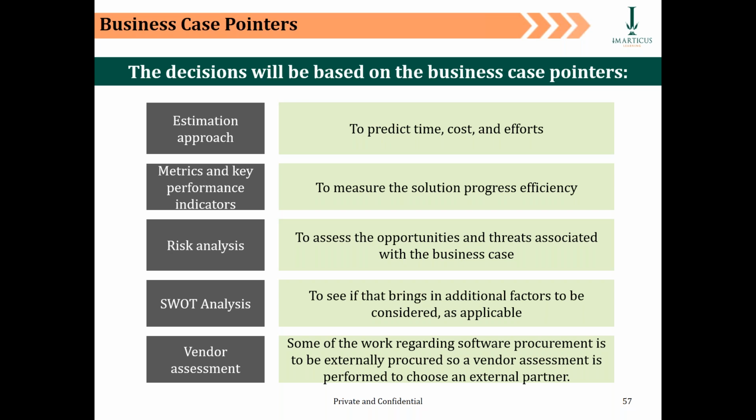Third thing is effort. There is a requirement which has an IT orientation, so it needs to go through the SDLC. After I finalize the requirements in my BRD, what is the total effort required by the IT team to, number one, write the design specification; number two, write the functional specification; number three, write the technical specification and then do the programming; number four, do testing, three, four, five types of testing as required in the project; and number six, deploy the functionality into the production system and make it go live.